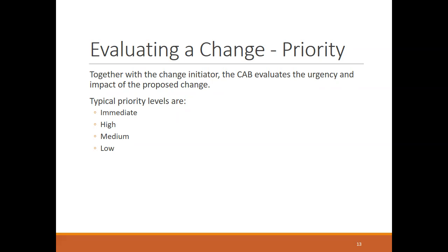You're in a bank and you have some things in the computer system. Maybe you want to make some little changes to the HR system so that the HR manager can automatically call any one of the employees by just saying their name into a microphone which is connected to the database. Oh, that's a nice thing. Saves the HR manager a bit of time. It's not going to stop the company from working, so it has a low priority. Working from immediate to low, immediate needs to happen right now.